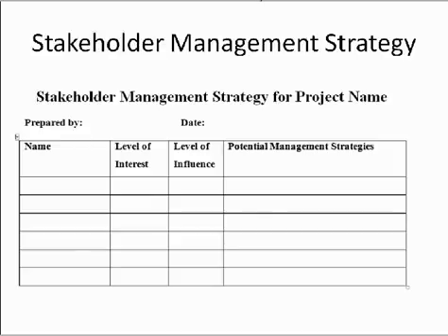As I previously mentioned, you need to manage these relationships of the team and develop a feeling of support among the team. The main information you're looking for is their level of interest, level of influence, and a management strategy for each. Since you are dealing with very personal information, only the project manager and a few key members should create and have access to this document. So let's look at an example.